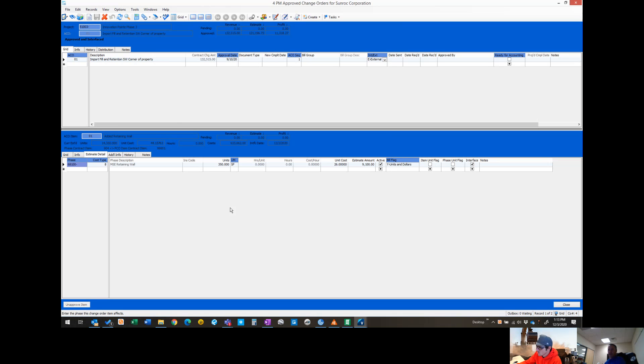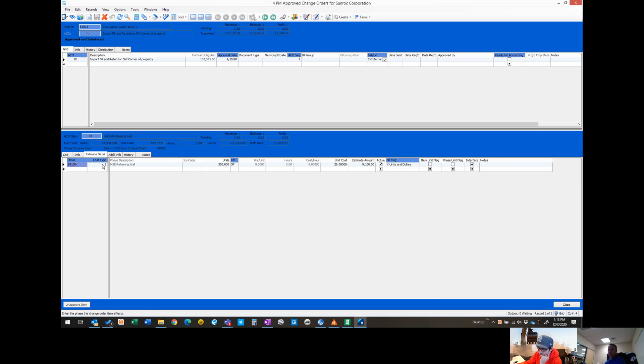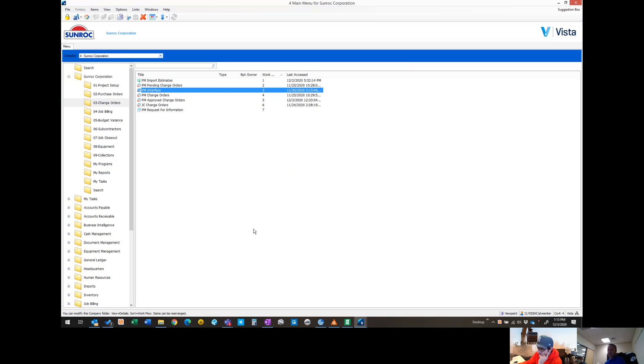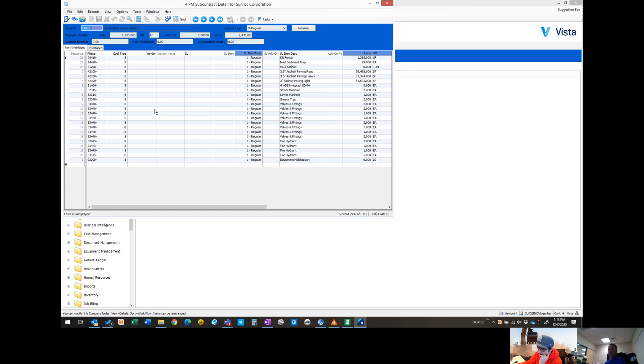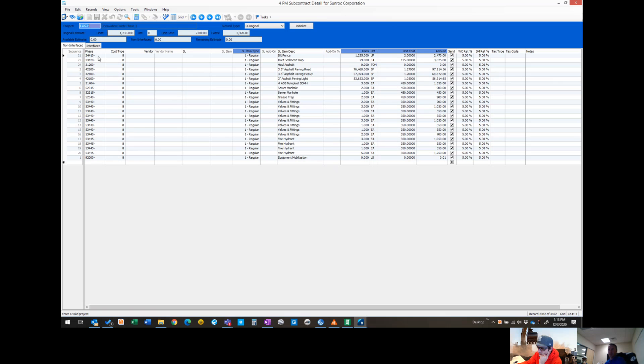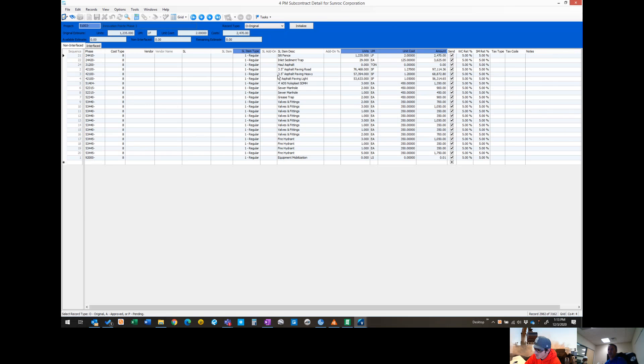Those are the basic steps. Anytime you have a change order that you've entered in estimate detail with a cost type 8, it will automatically throw that into the PM subcontract detail. Normally if you just open the PM subcontract detail, it will come up with just the record type of original. If it's coming through a pending or approved change order, you have to change that drop down to be able to see those change order items that weren't part of the original contract.